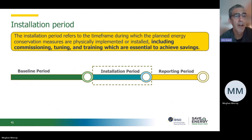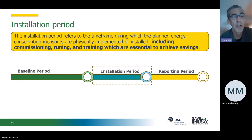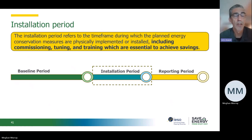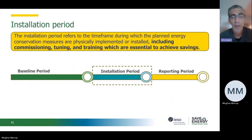The installation period: in a conventional project there's equipment put in — boilers, variable speed drives, heat recovery units, and so on. Part of that period is tuning, commissioning, and maybe training O&M procedures — whatever is needed so that the project is confirmed and operating as intended. That comprises the installation period before the M&V reporting period starts. It's important to think of all the facets of that — not just the install, but the tuning, commissioning, and commissioning reports to validate it.